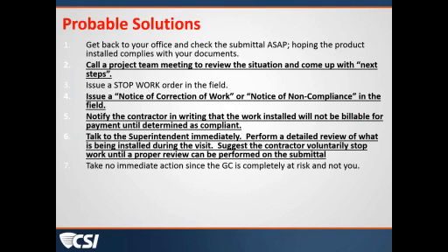Now, we're not clear on the facts as to why it sat there for so long. It could be because one of the slides noted that the waterproofing was being installed a little bit ahead of schedule. It could be that the architect hadn't looked at it yet because of the submittal schedule, that it wasn't due yet. So all those issues need to come into play when you're actually figuring out what your solution to the issue is.